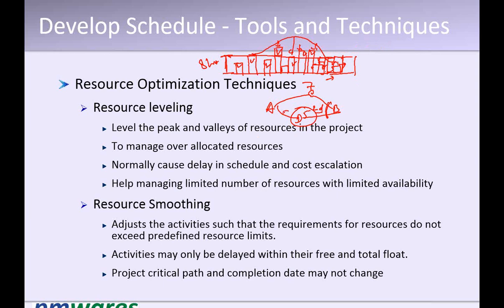Suppose there is an E also here, and there is an over-allocation here. You say, okay, instead of extending the time here, you adjust this over-allocation against these 2 days. So these 2 days will come down, and your E will not be over-allocated. Otherwise, if you don't choose this option, these 2 days will stay there, and this will go ahead. Actually, in this case, it will be done automatically. But in many cases, it may not be done.